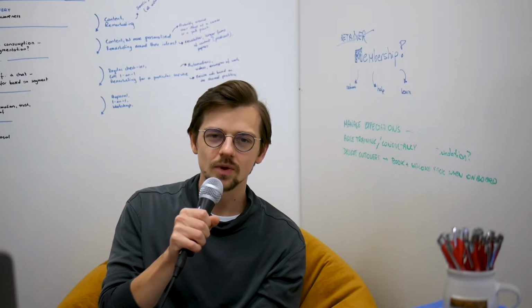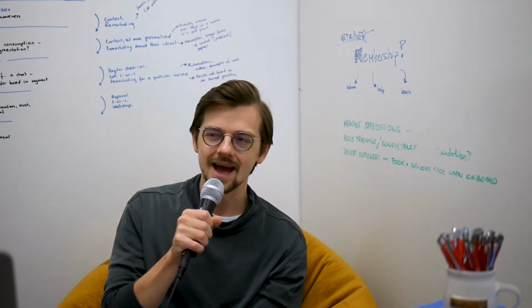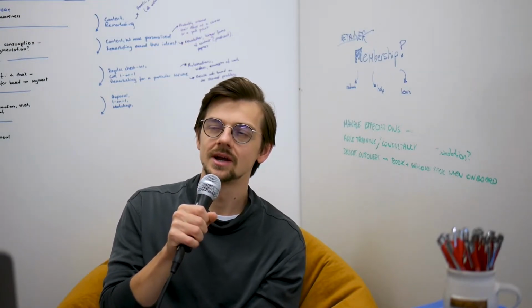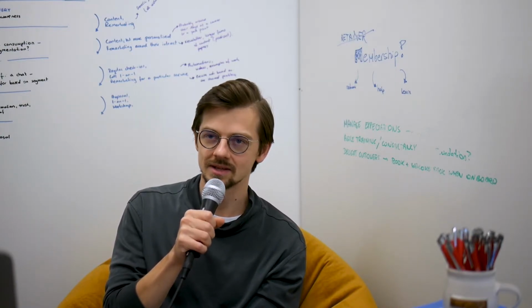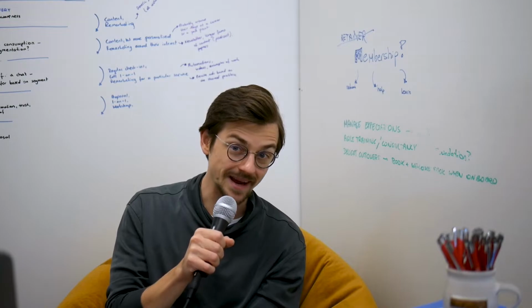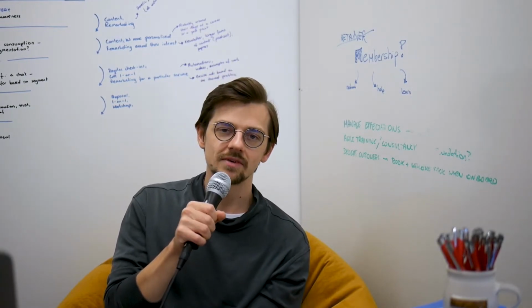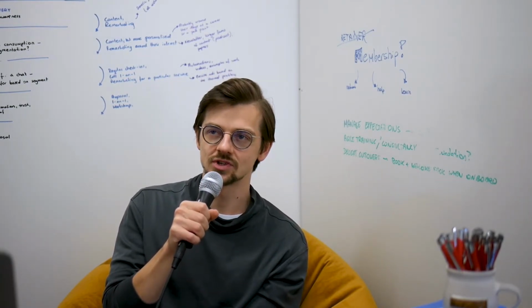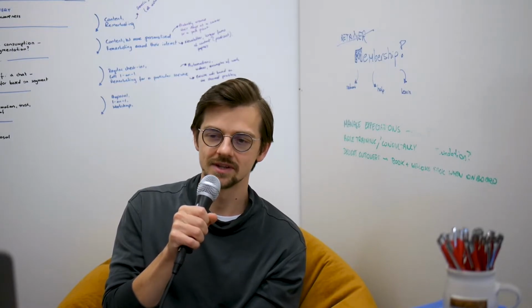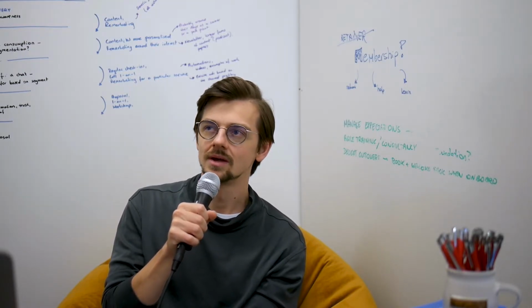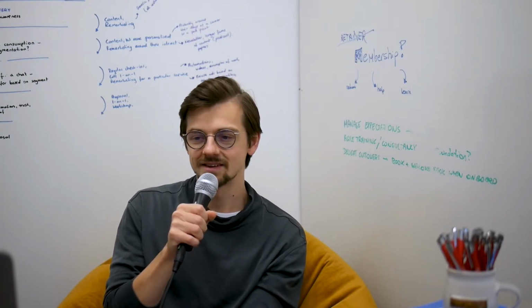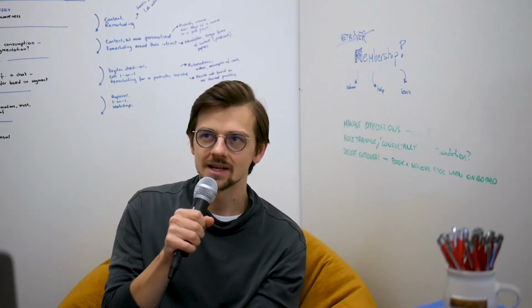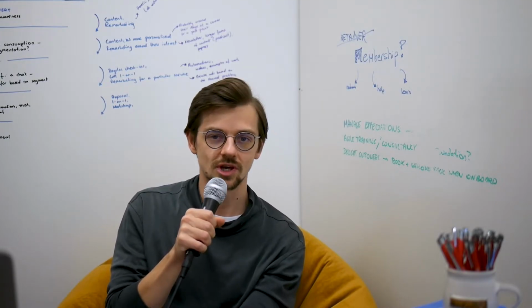Another moment when you can incur the design tax is when either the designer misinterprets the requirements and designs something that's not in line with what was expected, or you have a client that's just not happy with the designs and they keep suggesting changes over and over again and the design phase never ends. That's also design tax, because there's no value in those changes.